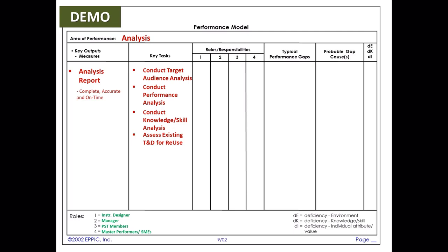And then what do you do? Well, we do an analysis report. We produce that report. Oh, okay, so you're done then, right? So that's all of it? And somebody might say, well, actually, no. We might have to do a project steering team gate review meeting. Again, this is my language. But we may have to go review our analysis report. Just because we produce one doesn't mean we're done. We're going to have to go make sure that others agree with what we've captured. And so we ask, well, how can you tell a good one from a bad one of those? Simple question, but it's intended to elicit what are the key measures for that particular output.